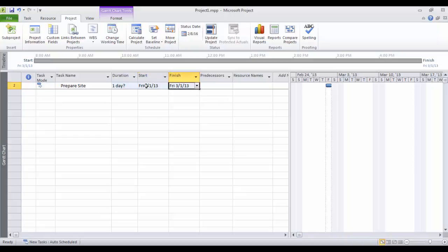And this is one thing you need to pay attention to: when you put a date on the start column here, it has a different meaning even if you use the same date value on the finish. The date on a start column means it is the beginning of that date, and the date on the finish column means it is the end of that date. So between the start of March 1st and the end of March 1st, you have 1 day.